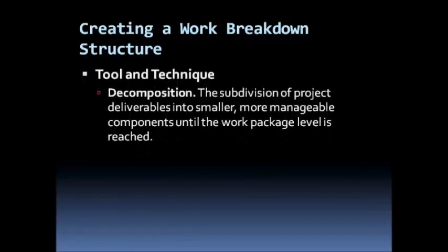And the technique we are employing here is decomposition. That is a subdivision of project deliverables into smaller, more manageable components until the lowest level, or the work package level, is reached. And we say that the work package level is the smallest level which could be estimated in terms of time and schedule, which could be monitored and controlled, and beyond that the only thing we could get will be individual activities.